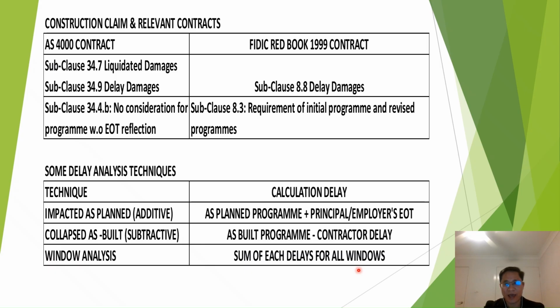This technique has the advantage that it can help us calculate delay on concurrent delay, or it helps us identify the changing of the critical path.